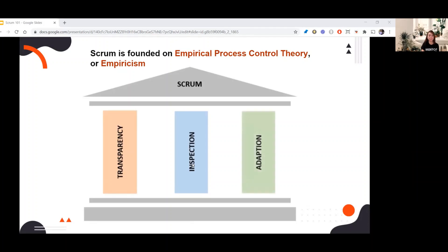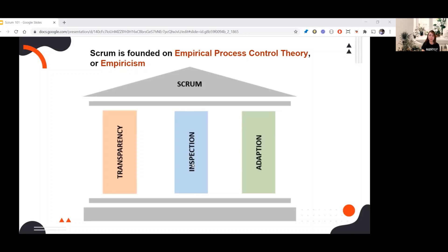The third pillar is adaptation — adjusting a process as soon as possible to minimize any further deviation or issues. For example, at the end of a sprint during the retrospective, the team identifies the things that didn't go well. On the next sprint, they start implementing solutions to those problems so that issues don't happen again. So those are the three pillars of empiricism: transparency, inspection, and adaptation.